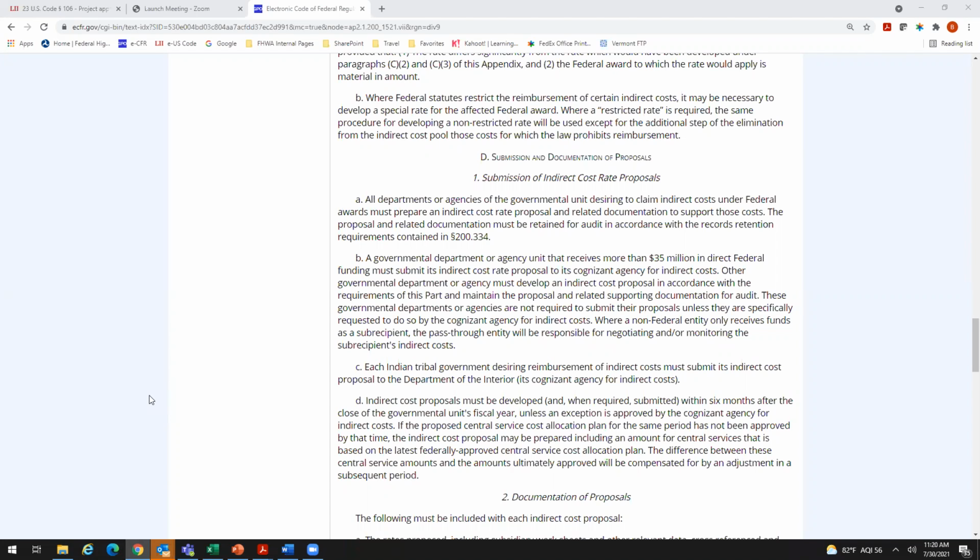It did come to my head when we were talking about FEMA money that most of the time that's not planned for funding, and most often ER funds are not usually charged indirect rates unless you have a special rate specifically for that ER event. In that case, I would say the local government should work with FEMA and say, hey, we want to develop our own indirect rate just for this event. We've already identified some of our costs, or however they want to do it. Then they could negotiate with FEMA and develop their own rate just for that FEMA event. That could be another option that you could recommend.